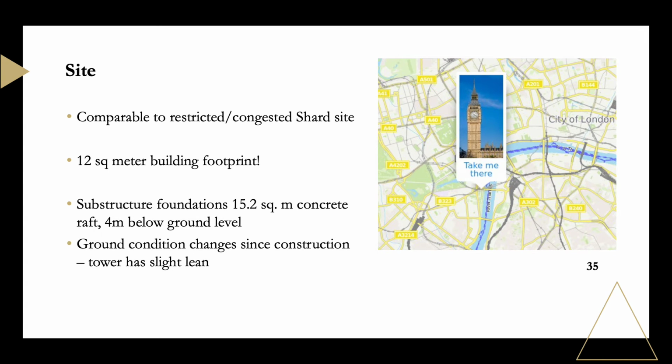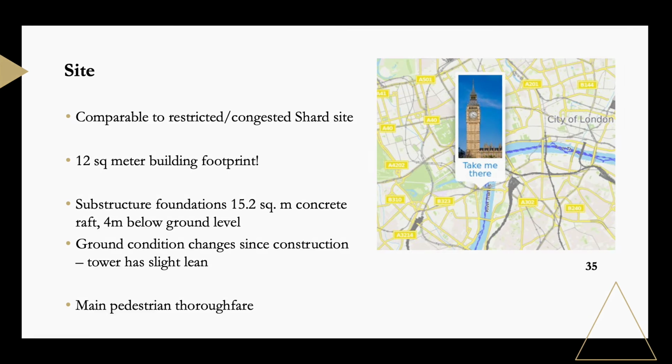The slowly changing ground conditions since original construction were worse than expected after intensive surveys, which contributed to an original increase in projected costs from 29 million to 61 million. Coordination of construction adjacent to the main pedestrian thoroughfare was also a challenge.